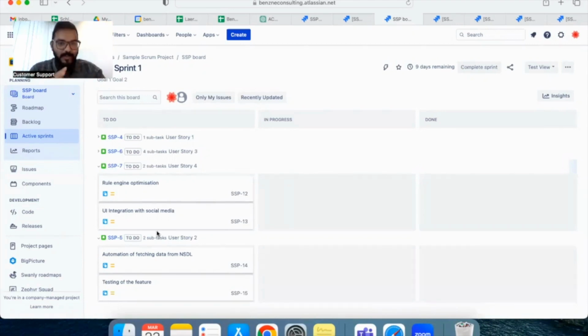And once the user story is explained to the team, finalize the approach to the user story and break it into subtasks. Before coming to the sprint planning meeting, ensure all your dependencies or blockers are resolved. Take the next story, again explain the user story, break it into subtasks, and finally, when your capacity is full, you can start the sprint.